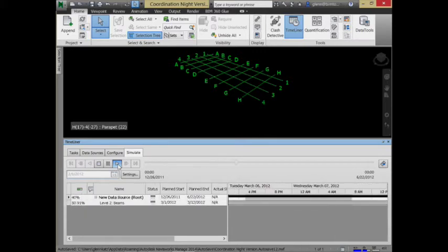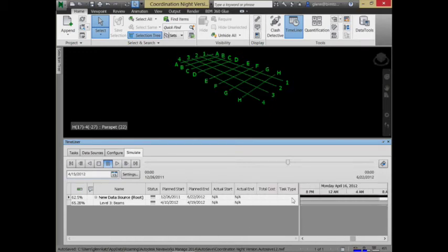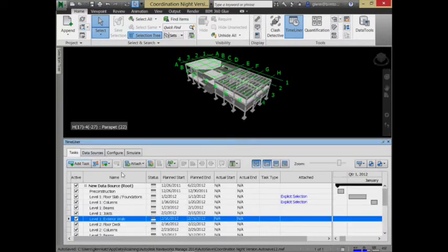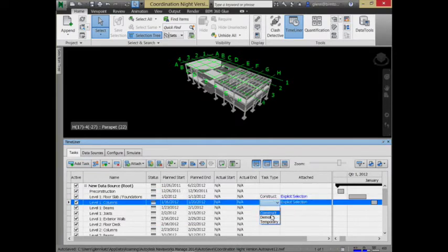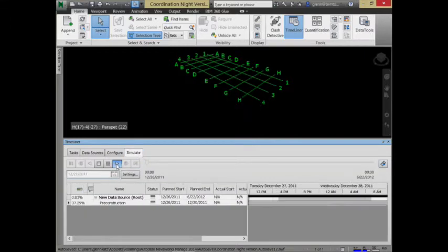It's kind of interesting. It's not showing me all those things. Oh, I'll tell you why. Stop it right now. Another important aspect we have to associate with each of the different items is what kind of task is it? Is it a construction task or a demolition task? I need to go through over here and say that these things are construction tasks. That means new things will appear as opposed to demolishing or something like that. Okay, let me run that again.